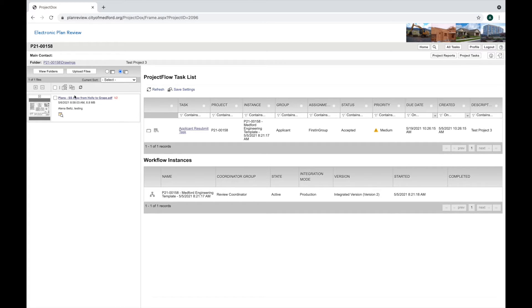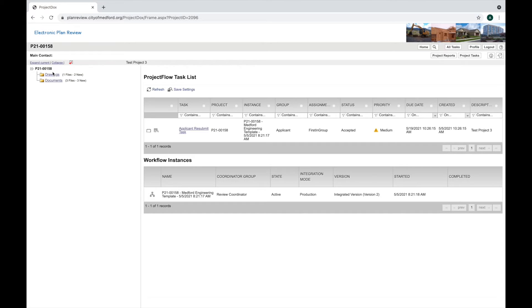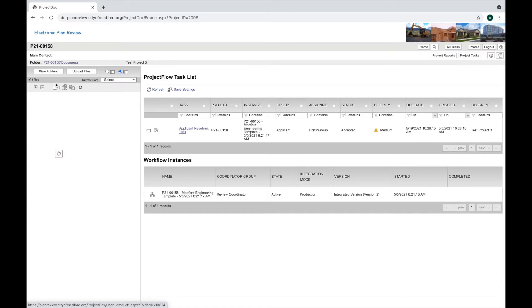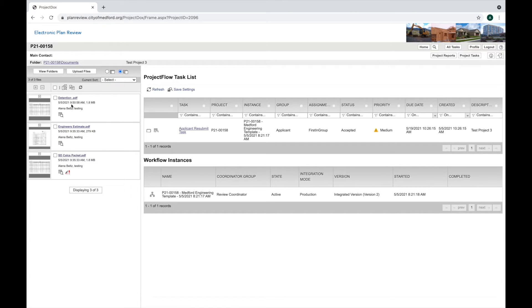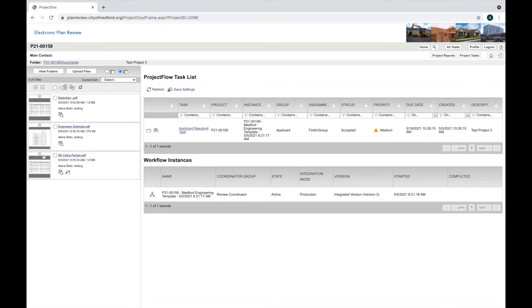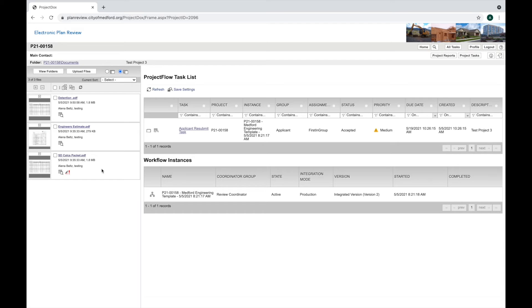You'll need to do that for any plans or documents that needed to be revised. So if you needed to revise your storm drain calculations, you would want to version over that one as well. Versioning is important because it shows city staff which is the latest and most current file and which one's ready for review and which one will end up being part of the approved package.